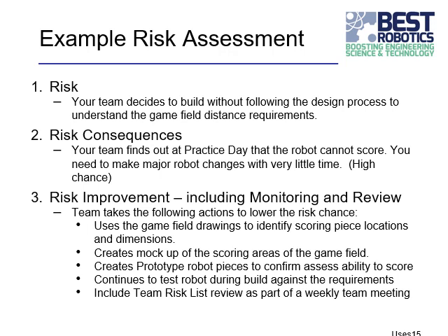Maybe your robot is too big, maybe its arm isn't long enough, maybe, in particular from the game field, you don't understand how to interact with the pieces. You're going to have to face, with only 2 weeks left, needing to make major robot changes with very little time. And if you're ignoring the game field distances and dimensions, that risk is pretty high.